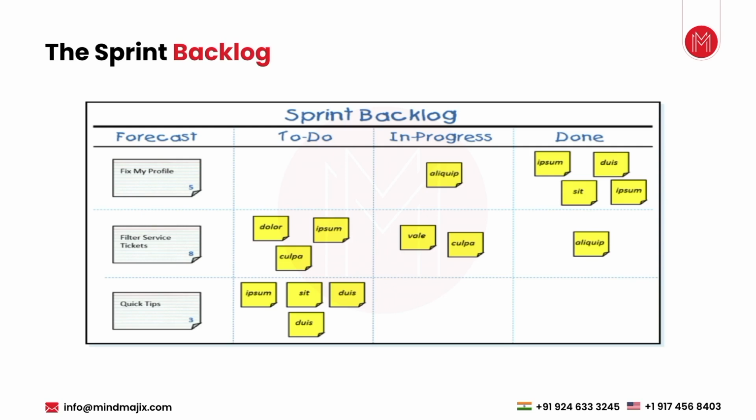Again, the product manager or the product owner will do estimation, will do the refinement, and if, suppose, that feature needs to be taken on top, then it will be taken. Otherwise, its priority can also change, depending upon what new product backlog items or new features have been added to the product backlog. So this is how it works: in a sprint, whatever task is not completed is known as the sprint backlog, and these sprint backlog items are sent back to the product backlog. Okay, understood? So this was all about sprint and sprint backlog.